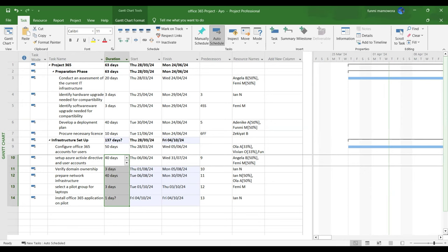based on all the plans we are having now, this is the issue we are having. Ola A is overallocated. We expect Ola A to do task 1, 2, 3, 4 at the same time, and Ola A doesn't have the bandwidth to do that. So it is either we move one of those activities forward to when Ola A will be free, or we bring in someone else onto the project to come and work on this task alongside Ola A. While Ola A is doing that, someone else will be doing that. So you can use this plan to make a case while you're speaking to your stakeholders or to people. Does that make sense?